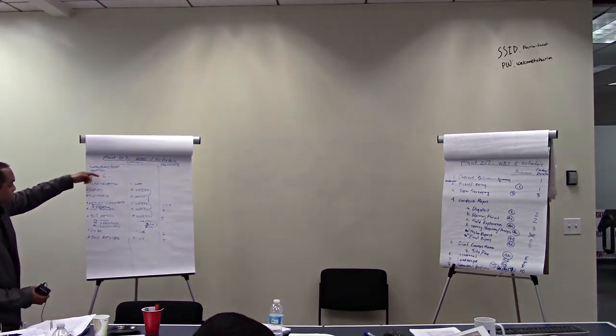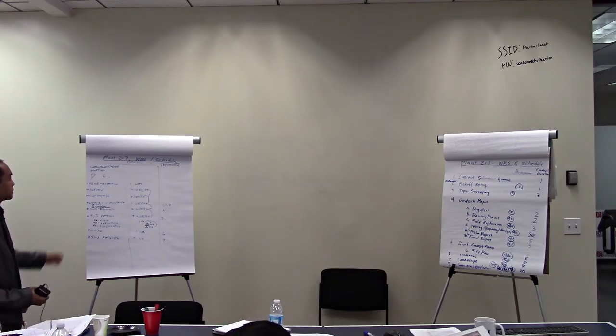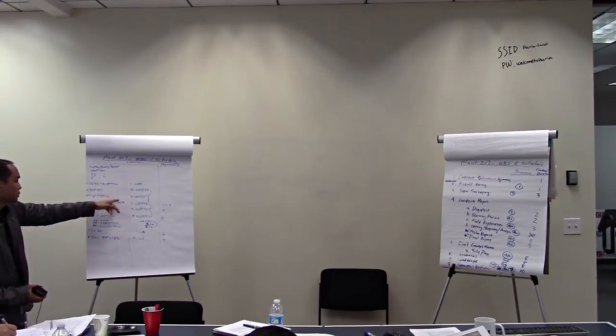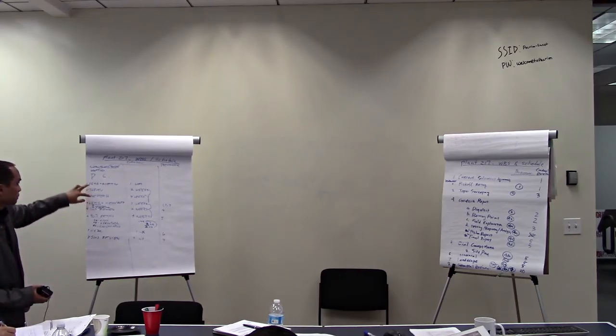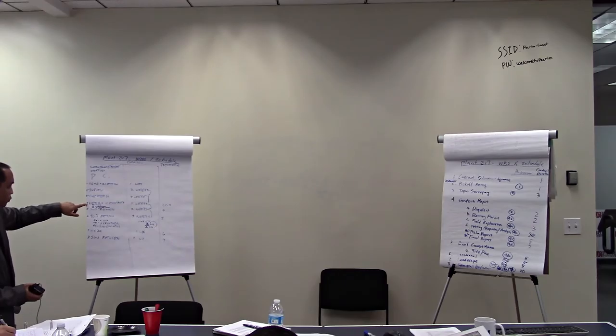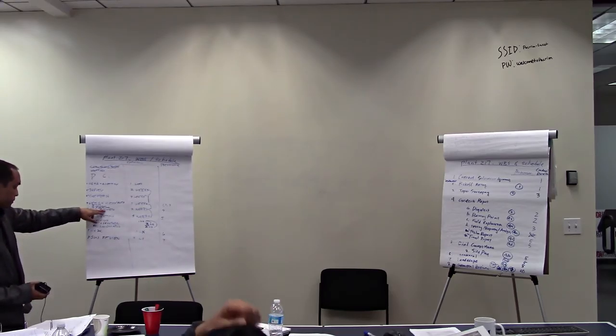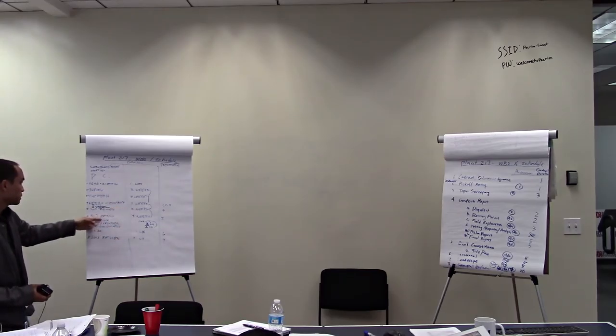Okay, so we assumed we got notice to proceed already, and then we did kickoff already. So the first task after that is data collection, getting as-built and record information, and then survey and geotech can go at the same time. We're just assuming right now survey will take 2 weeks, geotech will take 3 weeks, and these three are the predecessors to task four, design memo, which includes alternatives for civil, structural, and landscaping to be presented to the client.